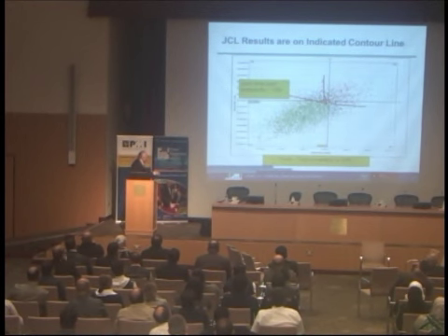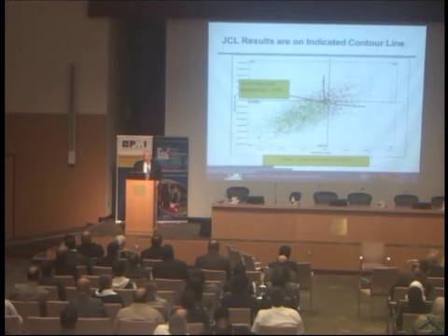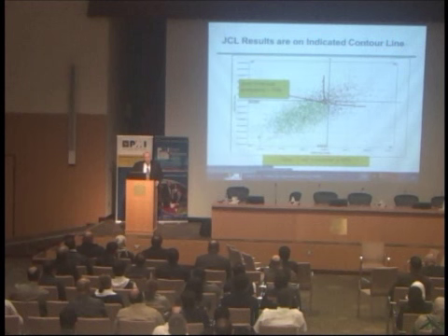Now, your plan is way down here, right? So this is the contingency reserve of schedule that you need, and this is the contingency reserve of cost that you need. But NASA is mandating integrated cost schedule risk analysis. And I was doing it at Petronas. I was doing it at ConocoPhillips. So it can be done, and it's not all that onerous.